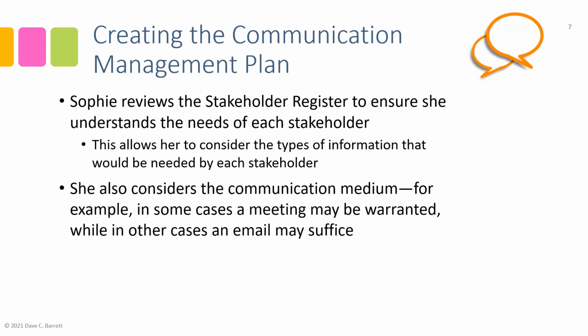And she also considers the communication medium. For example, for some things, perhaps a face-to-face meeting is warranted. In other cases, perhaps an email may suffice. It's those differences. It's not one size fits all. It depends on the type of communication, and is it interactive? Is it back and forth, or is it a one-way communication? Those are things that go into determining the communication medium.